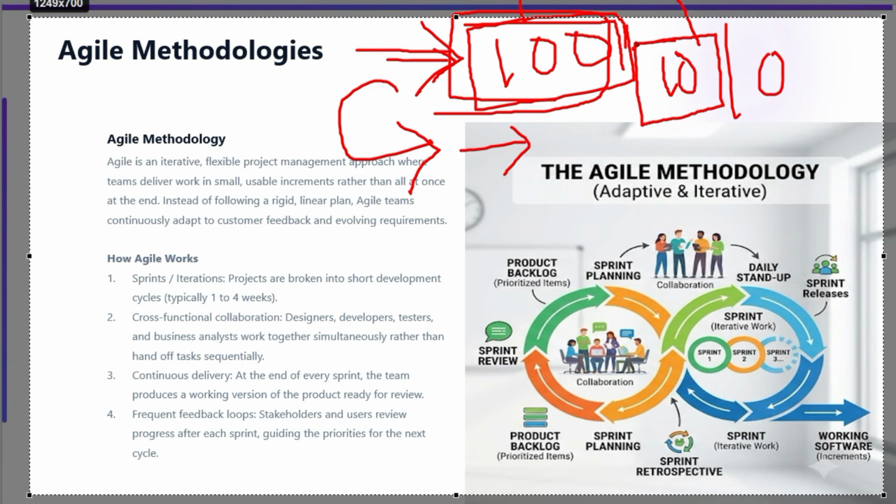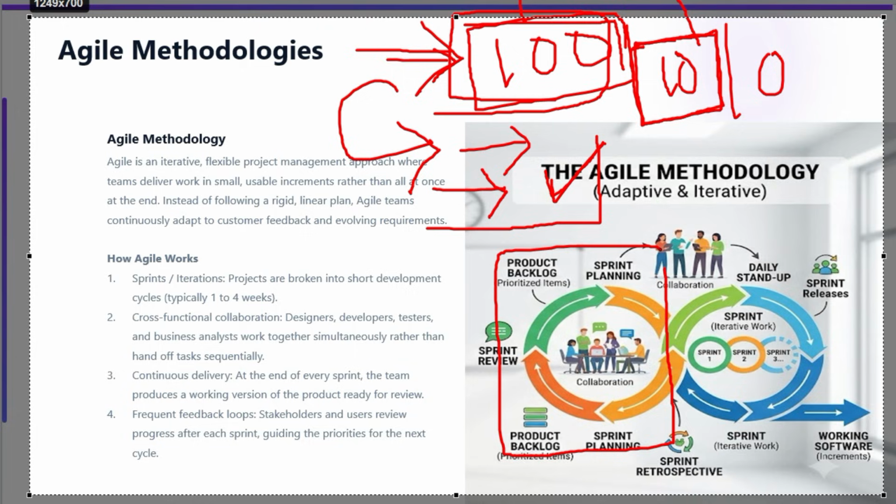The Agile team is going to focus on delivering these 10 features with an iteration every month. When the team delivers 10 features each month, the real-time users or your business stakeholders can start using those 10 features delivered at the end of the month. So, repeating the same cycle in Agile, you are going to deliver all those 100 features by delivering 10 features each month. That timeline is called a sprint in Agile Scrum.